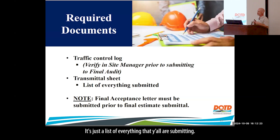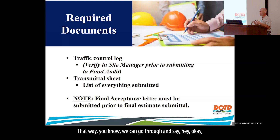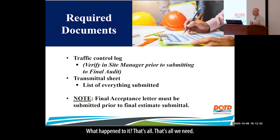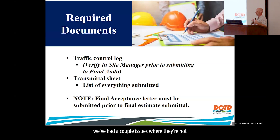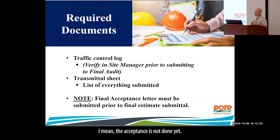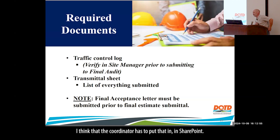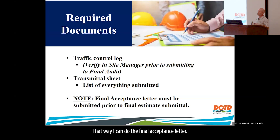A transmittal sheet — just a list of everything you're submitting — is also needed. That way if we don't have something, we can check whether it was submitted and track what happened to it. Before you submit the final, please make sure the final acceptance letter is done. We've had issues where people try to submit the final estimate package but the acceptance is not done yet. The coordinator needs to enter the final inspection into SharePoint so I can generate the final acceptance letter.